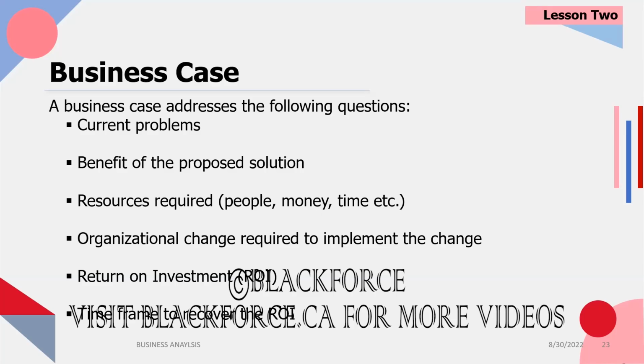It talks about return on investment as well. So we'll be investing $3 million over the next 2 years. Once the project goes live, we're going to be saving $2.5 million annually for the next 5 years. We're basically saying, give us $3 million and let us save you $12.5 million over the next 5 years. I don't think anybody is going to even entertain or engage with your business case if they can't see the return on investment. Just think about it this way. Somebody comes to tell you about a business. They tell you to bring $100,000, but you stand to benefit nothing at the end of it. Why would you even want to do that?